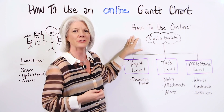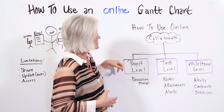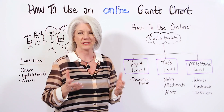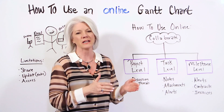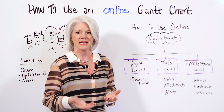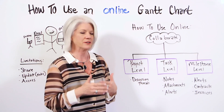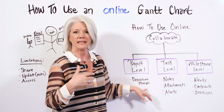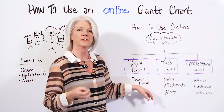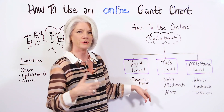Let's talk more about how to use your online Gantt chart to collaborate. There are three different levels. First is the project level. For the entire project and all the phases, you can create discussion threads. In those discussion threads, you can track different things happening along the way — any issues, any risks, or other comments you might want to reference during the project.